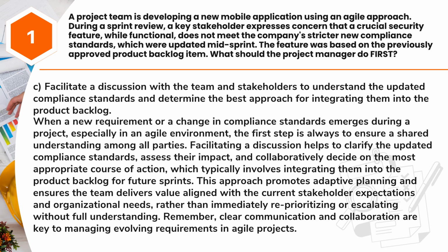Answer: C. Facilitate a discussion with the team and stakeholders to understand the updated compliance standards and determine the best approach for integrating them into the product backlog. When a new requirement or a change in compliance standards emerges during a project, especially in an agile environment, the first step is always to ensure a shared understanding among all parties. Facilitating a discussion helps to clarify the updated compliance standards, assess their impact, and collaboratively decide on the most appropriate course of action, which typically involves integrating them into the product backlog for future sprints.